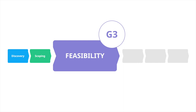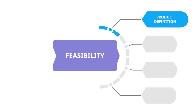The third phase, often referred to as the feasibility phase or business case, is the glue that pulls and holds your project together. During this phase an actionable plan for the development of the product or service is created. It is recommended to divide it into four steps. The first is product definition and analysis, to determine whether the product is desirable and solves the earlier discovered problem. Both quantitative and qualitative research — interviews, surveys, focus groups — should be conducted, alongside market and competitive analysis.